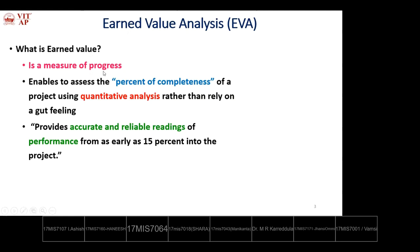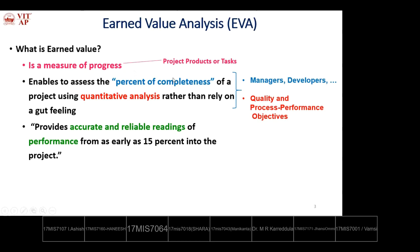Earned Value is a measure of progress — specifically, the progress of various project products or tasks. Intermediate-level project products' progress is assessed and reported. It enables project managers and developers to assess the percent of completeness of a project using quantitative analysis, rather than relying on a gut feeling.